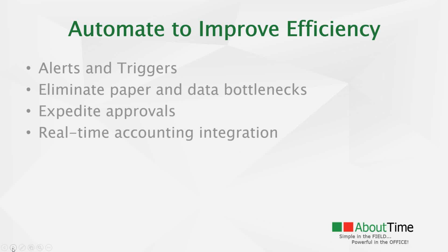What if you have a job that you're on and that job has some weather requirements that you cannot come outside of those requirements for safety concerns, for OSHA reasons? We have the ability to put notifications and alerts out to project managers when a job is outside of the weather specifications for that day.